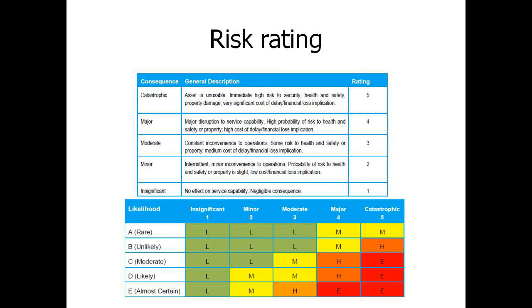So risk rating also, to use the Likert scale of 1 to 5, catastrophic to insignificant, makes it very clear then once we're starting to go through areas of access, for access for disability, fire protection, lift plant, such as the car, the controllers, those type of things, that we can risk rate those according to legislation, and that will highlight to us once we start gathering all the data and reconciling the total liability.